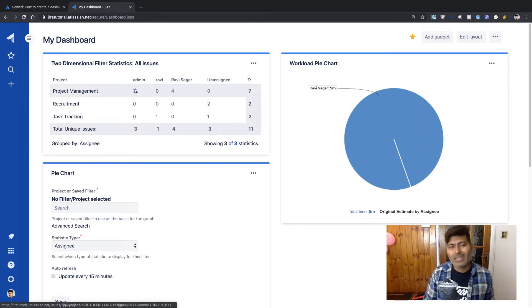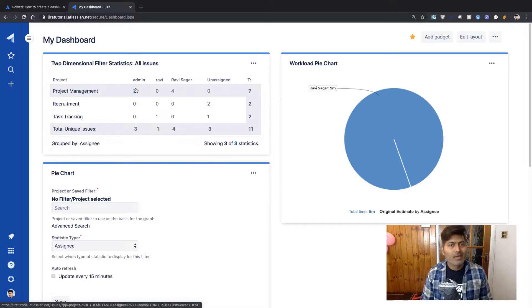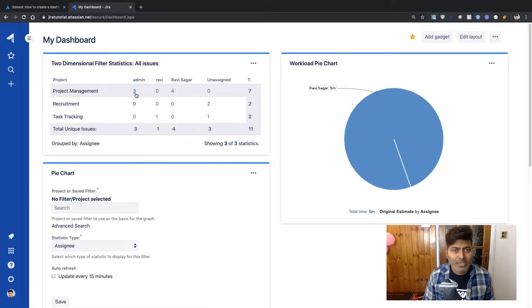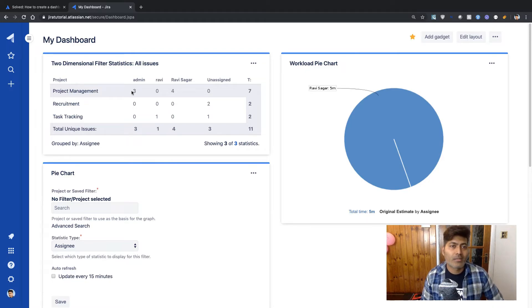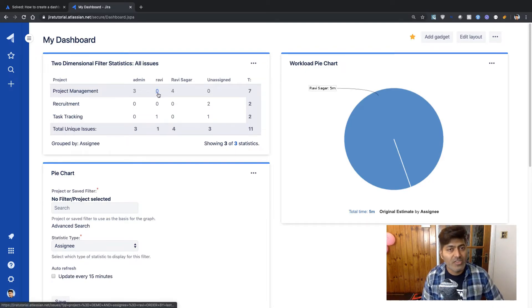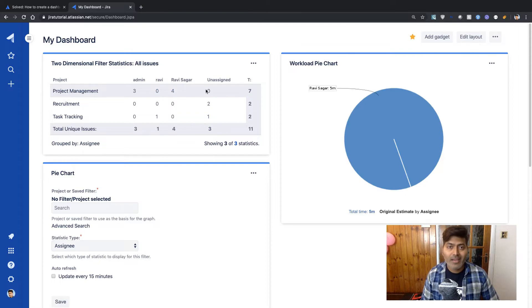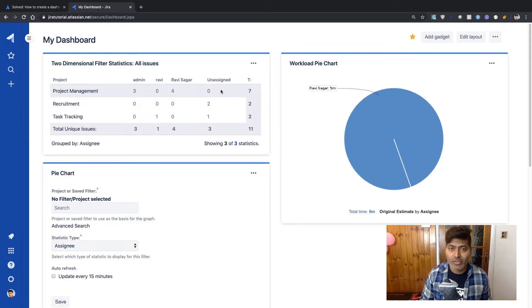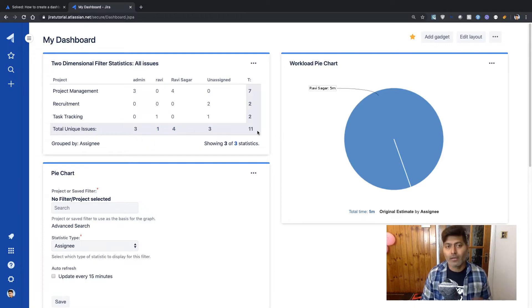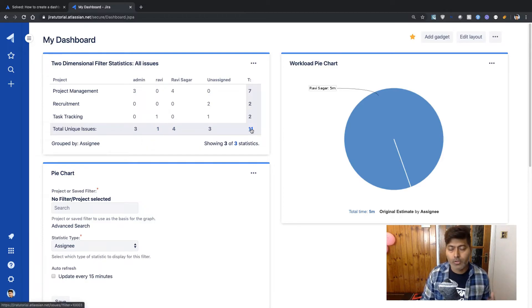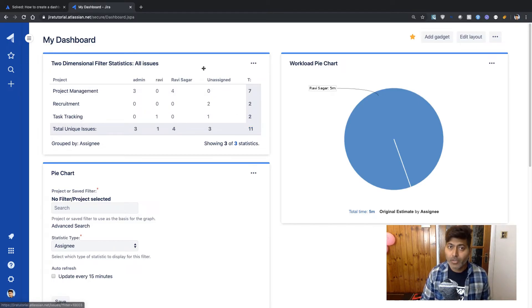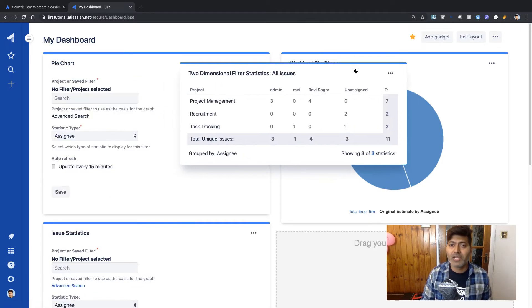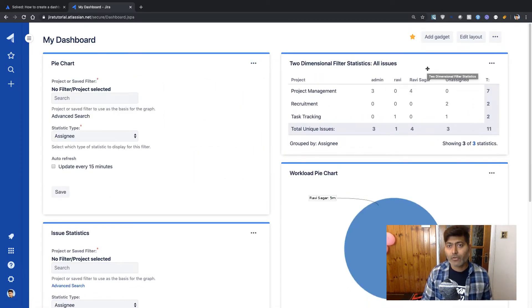And it will give you a nice table showing you the status, not really a status, but the count of issues assigned to different assignees. Like right now we can see here that for each project, how many issues are assigned to admin? How many issues are assigned to Ravi? And how many issues are assigned to Ravi Sagar? And how many issues are unassigned along with the total for each row and also for each column? And a total account of 11, which is all the issues in the filter. So this is really interesting.